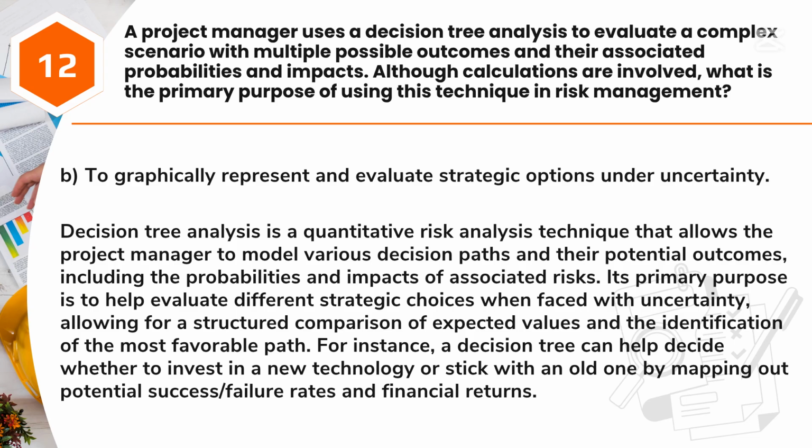Its primary purpose is to help evaluate different strategic choices when faced with uncertainty, allowing for a structured comparison of expected values and the identification of the most favorable path. For instance, a decision tree can help decide whether to invest in a new technology or stick with an old one by mapping out potential success/failure rates and financial returns.